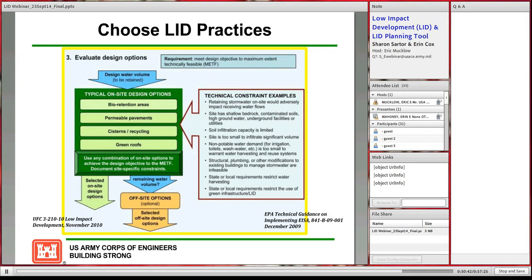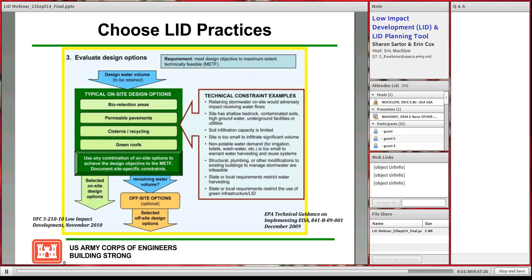Q: Are the costs for LID BMPs detailed on the 1391 only the cost of the LID, or are they the delta between conventional and LID? A (Bill): The actual cost of the LID BMP is what should be identified on the 1391 Tab A. A construction project might have 10 or 20 different BMPs and each one should be itemized separately. That is the total cost of the LID BMPs, not the delta between traditional strategies.